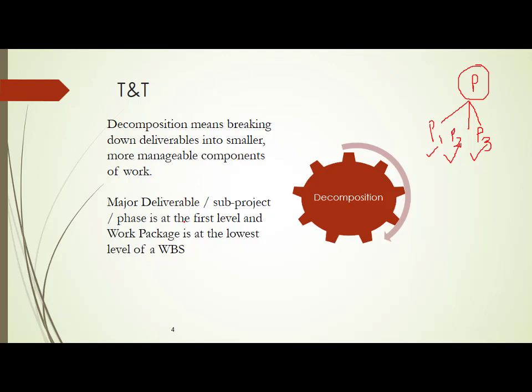So the project scope statement, what you have seen, is nothing but the work to be accomplished in order to bring out a product deliverable. But how are you going to achieve that work? We are going to break down that work into manageable components. And once you break down that work into manageable components by decomposing it, the manageable components you get are called a work breakdown structure.